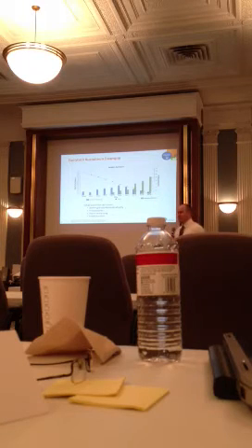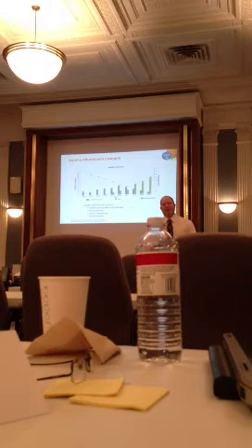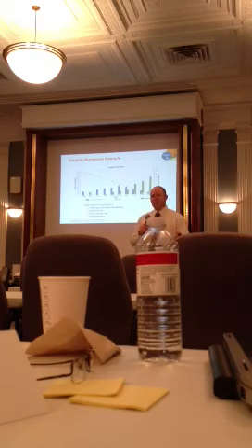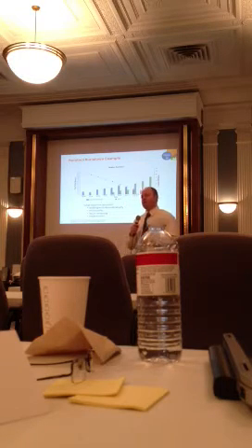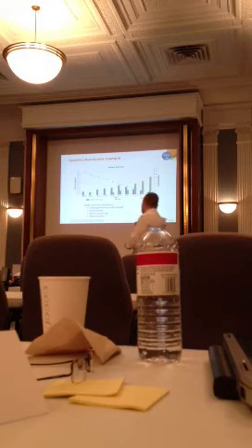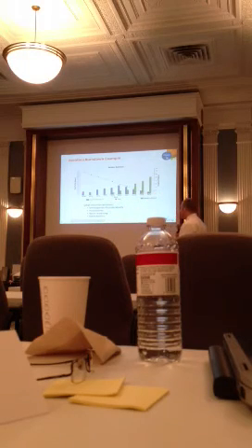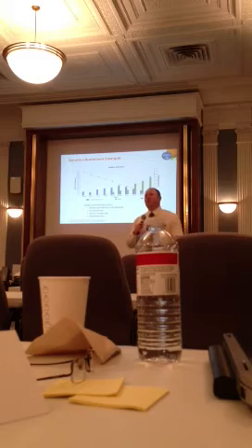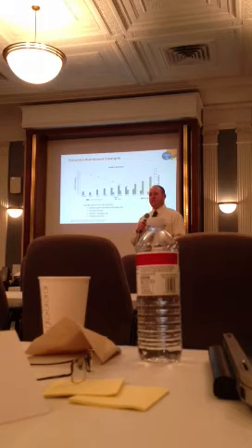So now as we deliver, and I'm going to try to make this easy, we had 350 total hours of tasks. So every day, if we're doing it by the average, we're doing 35 hours worth of task work per day, right? So I had 50 that I had already known, but I got 35 done, so that would take me down to 15, 50 minus 35. But then on day 2, we pop back up to 40. That would mean that we added about 25 hours worth of tasks on day 2.